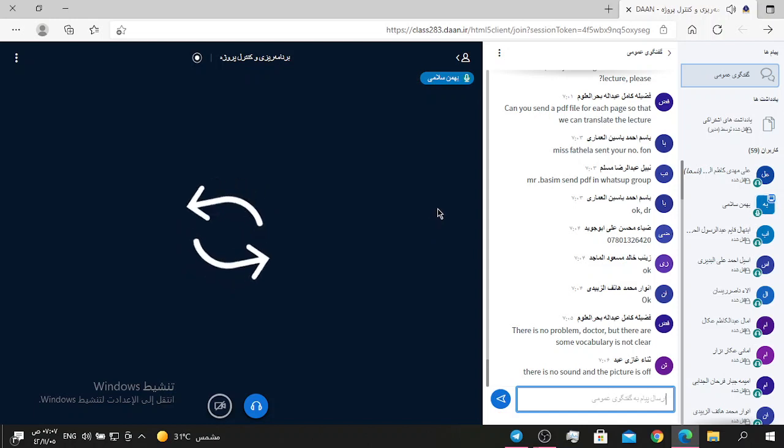Leads or lag is not related to the duration of the activity. It is related to the logical relationship between the activities. Activities and the related assumptions should be documented.